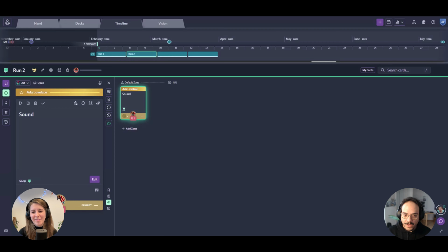But it's also an actual production concern, right? If you have a lot of delays in your process, in your pipelines, in your journeys, and so on, this will cause a problem in the long run. So you want to know about it, just to have a discussion about it and clarify, why is this card not making progress? Is there maybe some uncertainty? Is the card not specific enough, and so on?